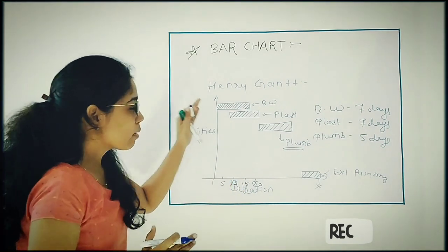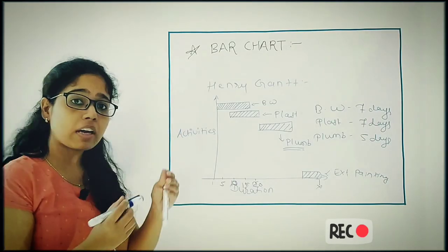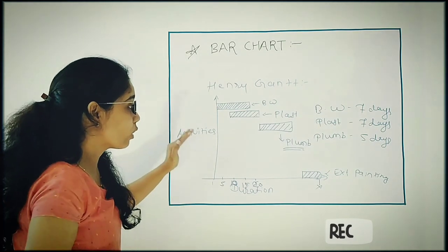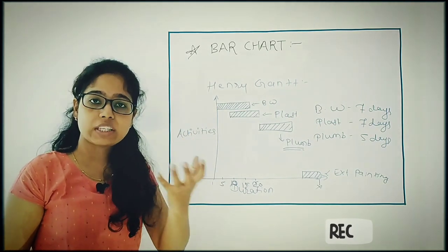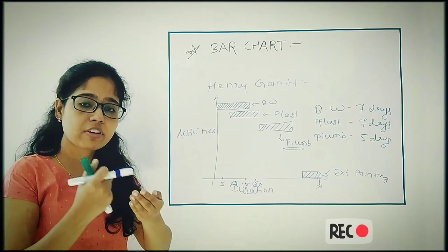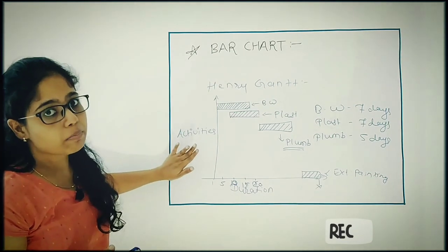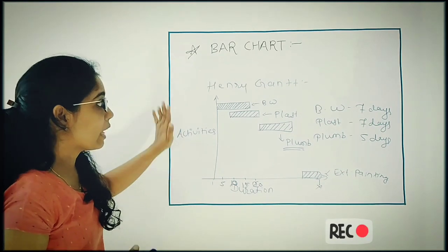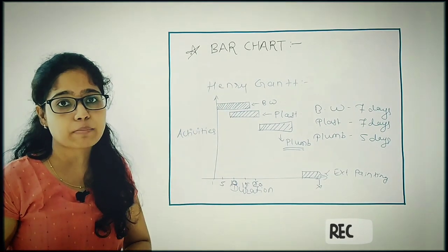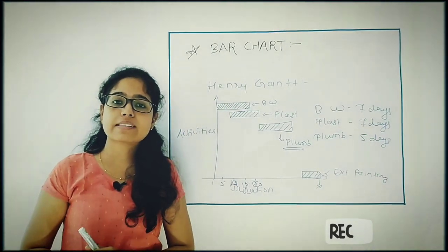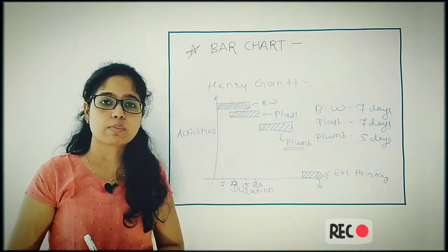This is the simple bar chart given by Henry Gantt where this method is only implemented when the project is small. If the project has fewer activities or small duration, only there we can implement this method given by Henry Gantt, that is also called a bar chart.